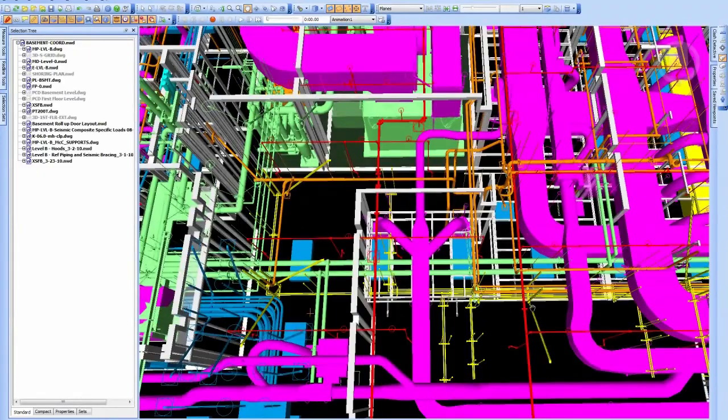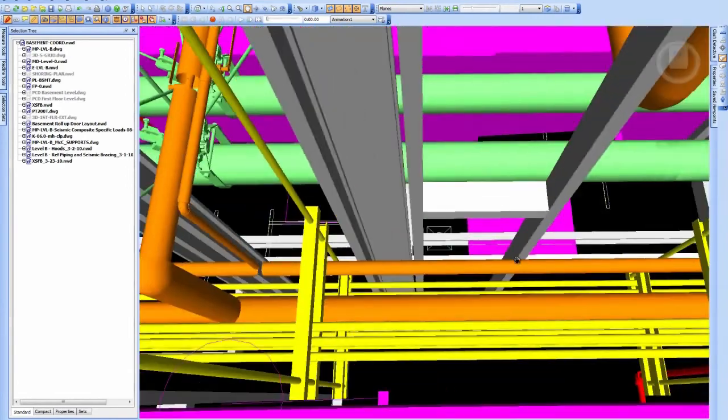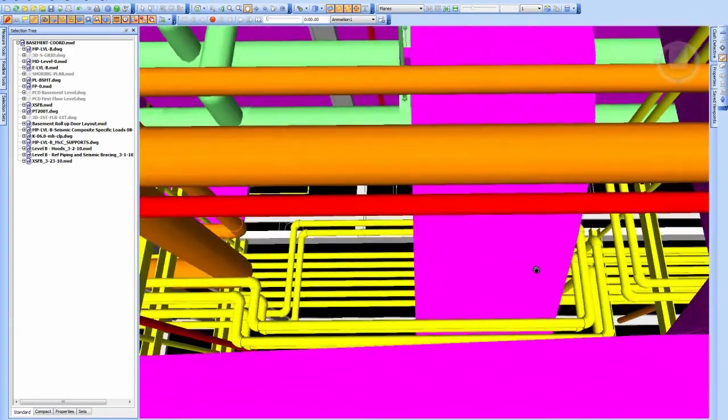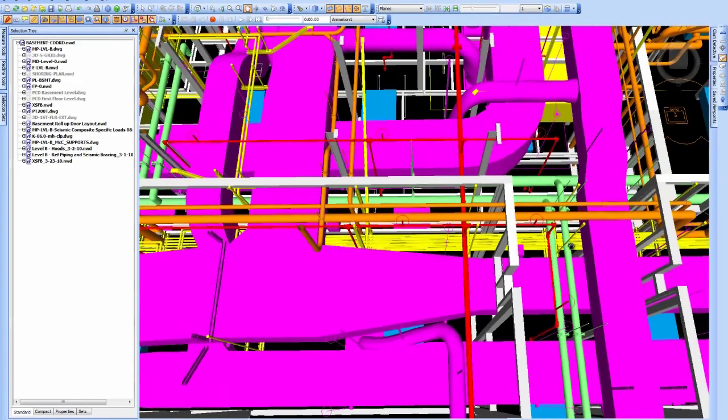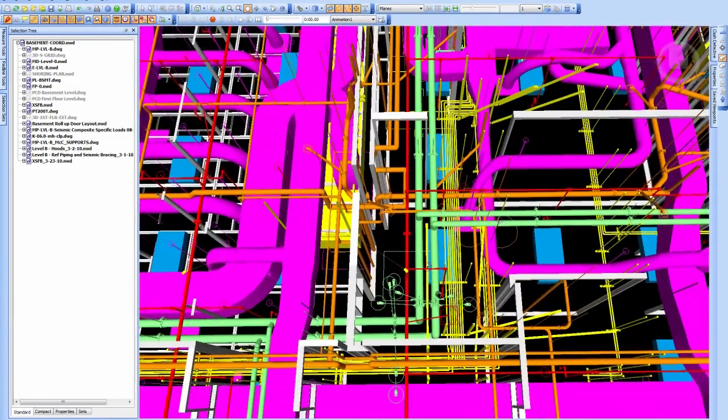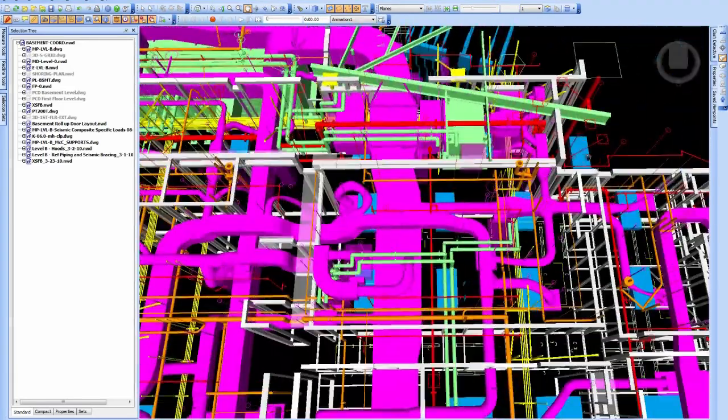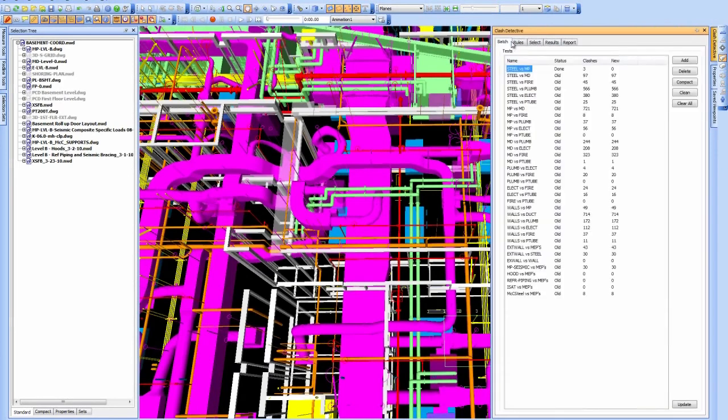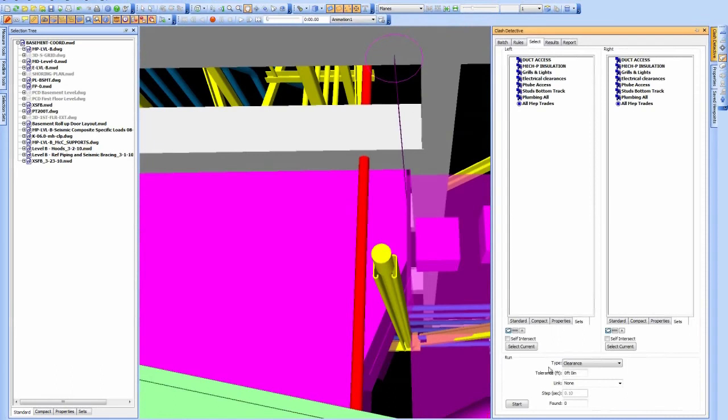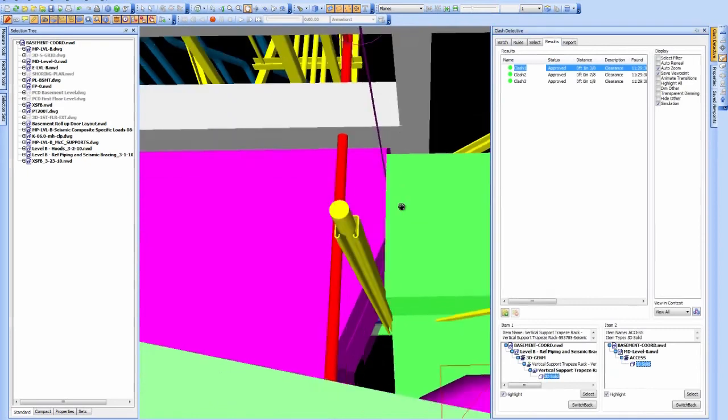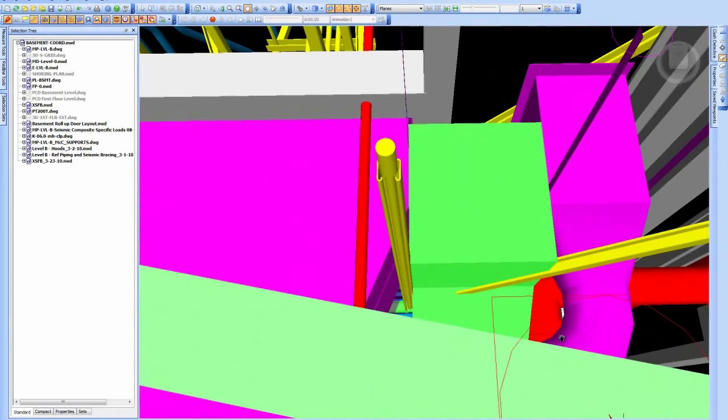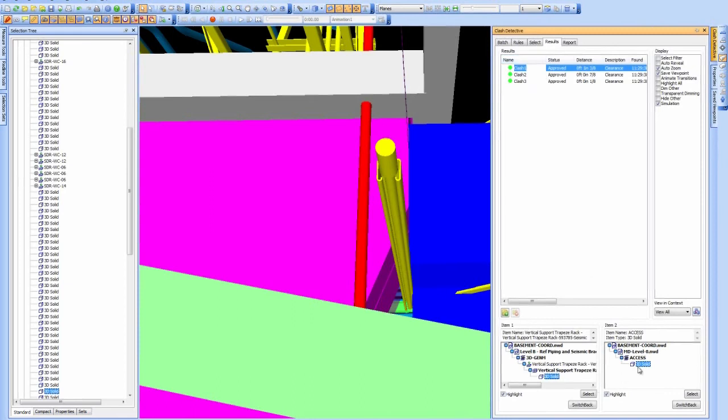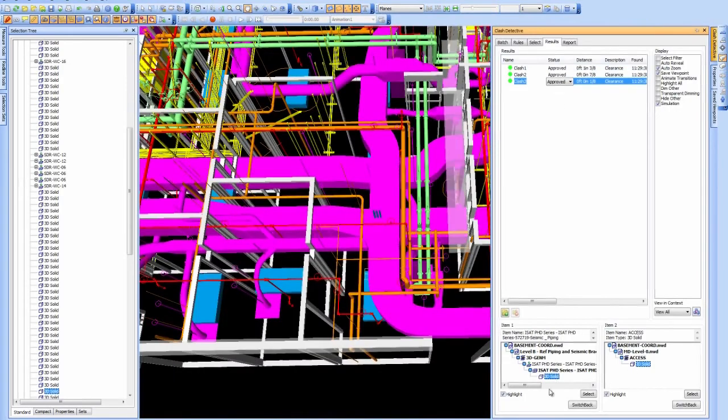So as I pan around this clash detection model, we can see in yellow is the refrigeration food service component of this project and you can see just how tight everything is and can get in these modern hospitals. We also have the ductwork is magenta and electrical is blue with mechanical systems being light green. So let me open up the clash detection tool and we'll select both the mechanical and refrigeration. Hit run which clashes the different pieces together and here we see the clash between the mechanical access zone and the refrigeration seismic bracing that is required here in California. It's green because the clash was approved due to this being a clearance zone for mechanical ductwork filters and we were able to get away with that.